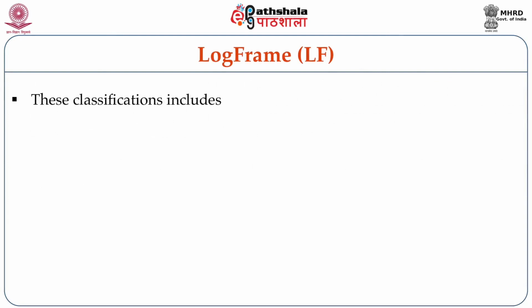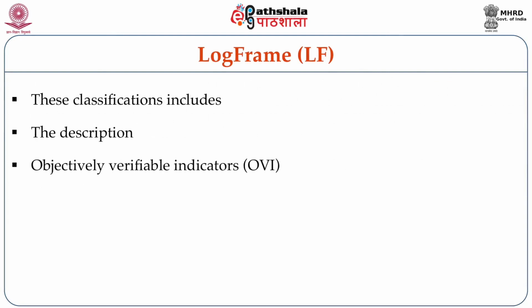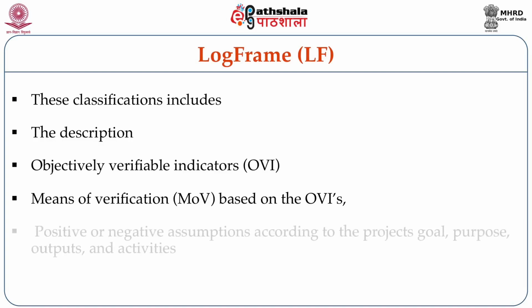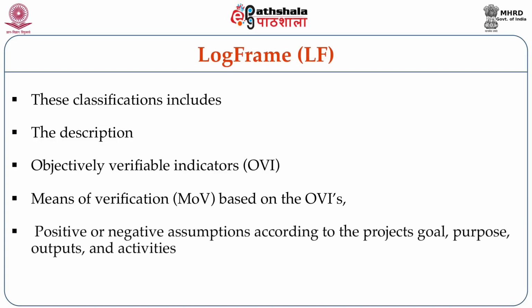The classifications include description, objectively verifiable indicators, means of verification based on the objectively verifiable indicators, positive or negative assumptions according to the project, according to the project outputs and the activities and the purpose of the project.